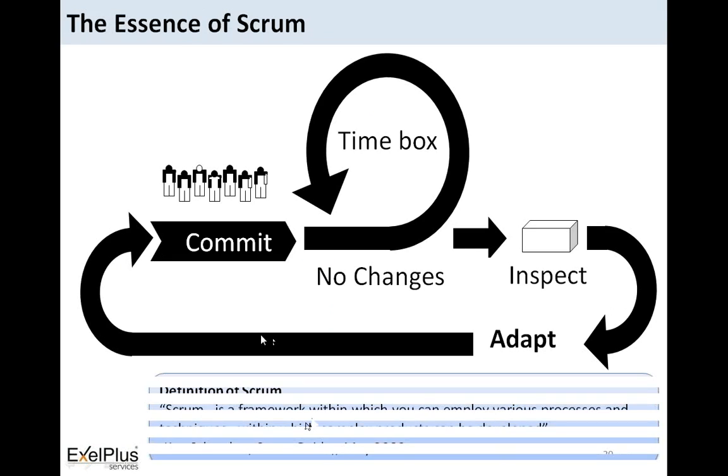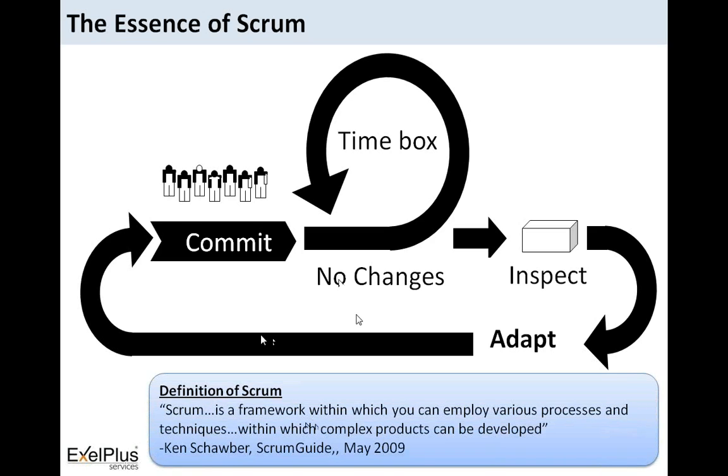The essence of Scrum is that whatever activities are in Scrum, they are all planned in a time box, and whatever features or requirements need to be adhered to will be delivered at the end, based on acceptance by the customer. So whatever the Scrum team is going to do, they will put their activities in the time box. Normally this time box will vary from 1 to 4 weeks. That means they will not go beyond 4 weeks. There won't be any working software that gets extended beyond 4 weeks. They have to deliver something working within this time box of 1 to 4 weeks.